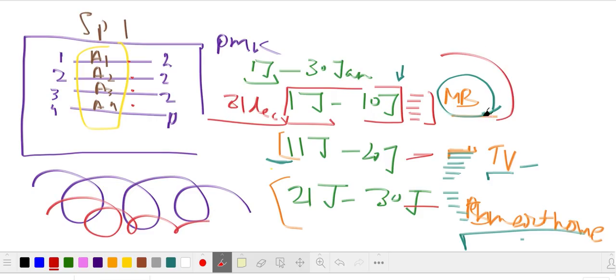When your wave is here, you're only talking about this in detail. You know what's going to happen in the next 2 sprints, but you're not talking about them in detail. When the wave pushes you and you are in the next sprint, on 11 Jan, then you're going to talk about that sprint. This is exactly what rolling wave planning is.